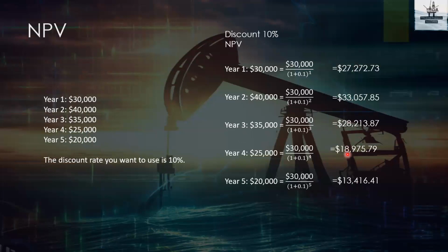So right now, if you add these values, 27 plus 33 plus 28, it will not come near to 100. It could take one more year. Here it is showing 4 years are required to reach your $100,000, but the earlier prediction showed around 3 years. So this is how NPV will help you with the discounted price. How many years are required to reach the amount that you have invested can be estimated. Since the money value is reducing, earlier with the predictions we had 3 years, but with the discounted amount we are getting around 4 years.